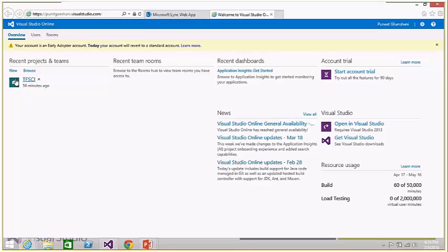Now, once you have the team, all the workflow and everything set up, what happens is typically you see new, approved, committed, and done statuses of the task, which means a business analyst or a person who's closer to the business gets the requirement for you. Someone in your organization can say, okay, it is approved. So you can say, fine, let's say it is approved. And it would come up as an approved state. Then you can start working on it and you can assign the subtasks to people who are working on your project.